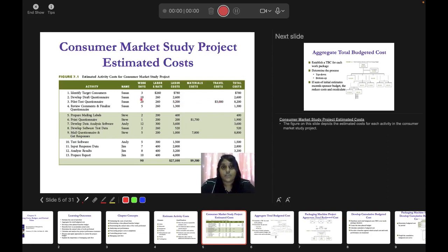She is going to travel for 20 days and her travel cost is 3000. So each day she will be using a fixed fuel rate of $150 per day, since here it's all in dollars. So for the third one, you add 5200 plus 3000, and it is going to be 8200. This is how you get all your costs figured out.